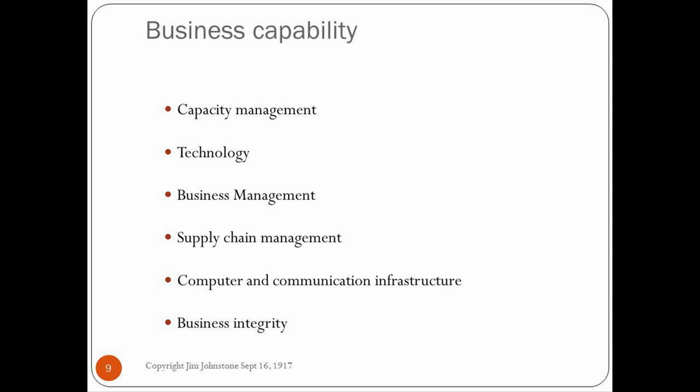So look at your supplier's ability to do what you're asking them to do. Do they have the technical and managerial capability to get it done? Look at what they're going to do when they run out of capacity. Everybody runs out of capacity sooner or later. Sometimes it's because they have orders. Maybe you're increasing your order on them. Maybe other customers are increasing their orders. What are they going to do when they run out of capacity? Do they run out because they don't have the labor, the tooling, or the space to get it done? How long does it take them to solve each one of those problems? Those are key elements in determining the risk that you have that you're going to run out of supply from that supplier.